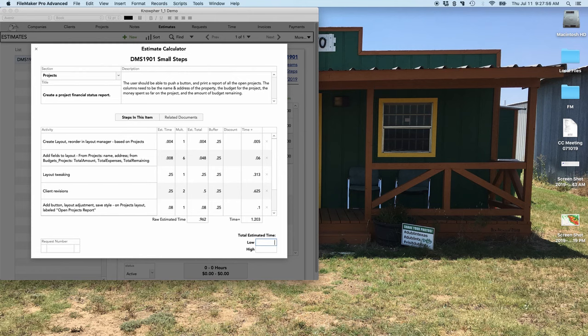And finally, all the lost time we're incurring here when we're estimating can now be rolled into these line items so that we don't lose any money. In fact, the estimates that we spent time on that didn't get accepted, those hours can be rolled into these estimates as well. So this is a way for you to recover that lost time that we all wonder about, how is that going to get paid for? Well, this is the way that you can get paid for that stuff. And so now you can focus your time on doing your best work and your best estimates rather than doing your most rushed work.